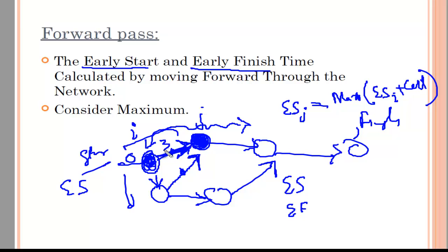So this activity, say for instance, has activity cost 3 and this activity has cost 5. Say this is B, this was A and this is C. You can go either through AB or through CB. C is also the predecessor of this B node, right? And I have to see what is the maximum of its predecessors. Is 3 maximum or 5 maximum? The 5 is maximum.